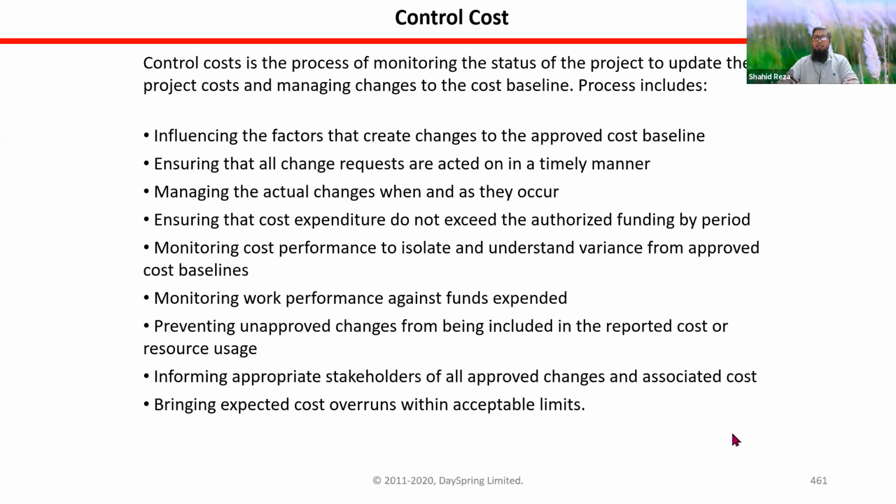And if there is any change required, control always talks about change, dealing with change. If any change is required related to cost, say the budget you have planned is not working, and the value of the material has increased, so you need more money. That should come through change management.